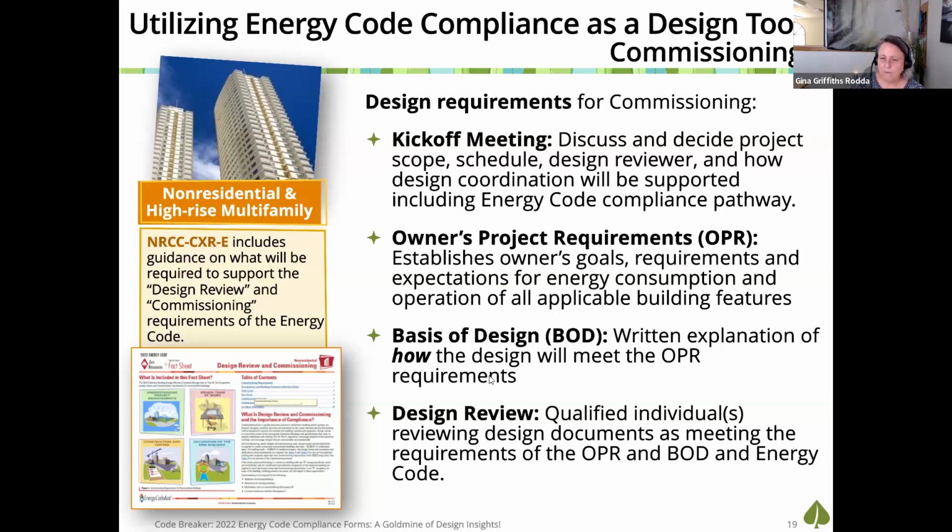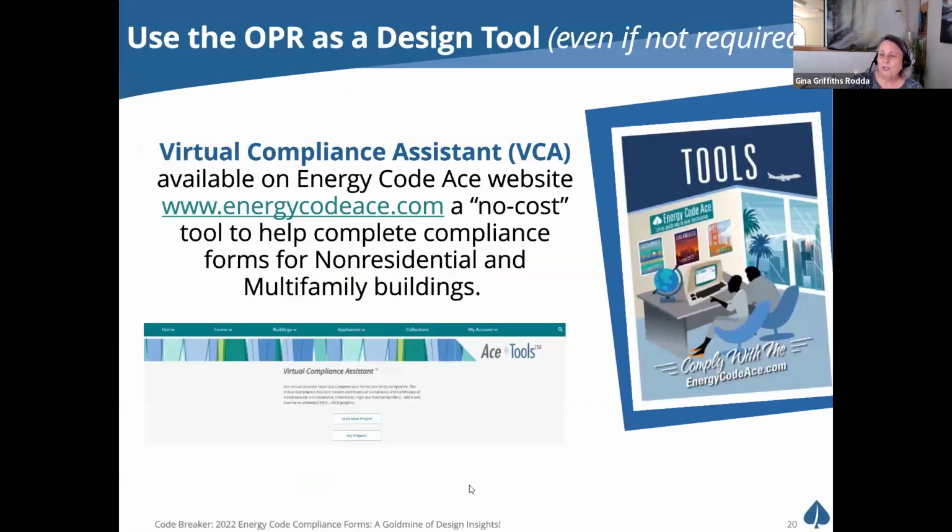for understanding how the building is meant to function and how it's using energy. And then design review is a special thing that we see under the Energy Code, in which we have another person look at the design before it goes to plan check, so that we have a plan check before we submit it for permit, to alleviate anything that is going to cause havoc by finding out so late in the game that something is not meeting code. And we're just helping support that plans examiner.